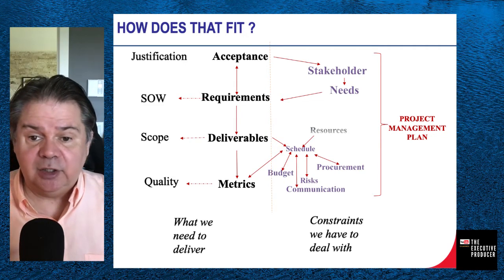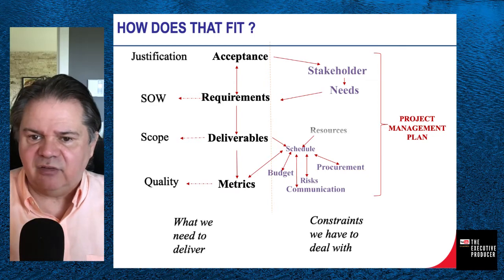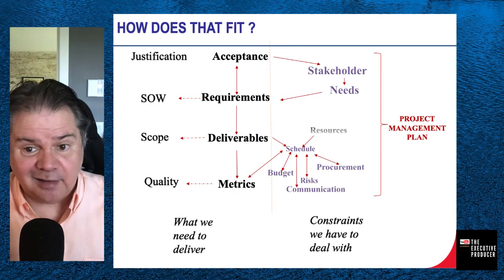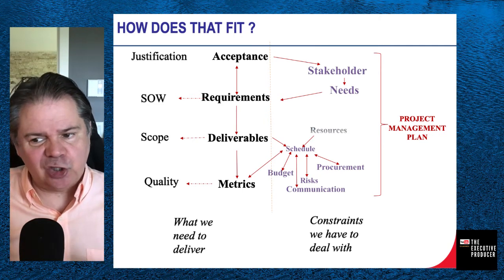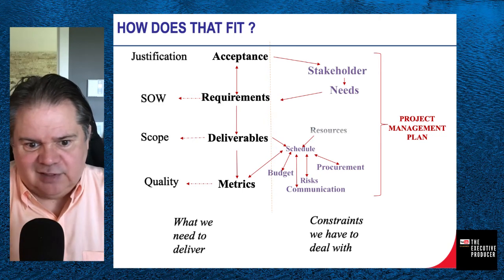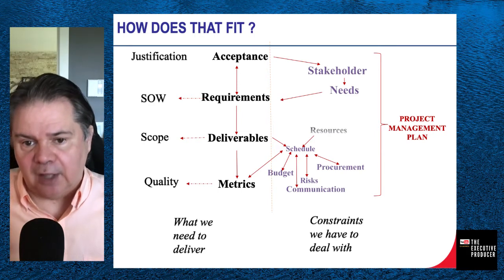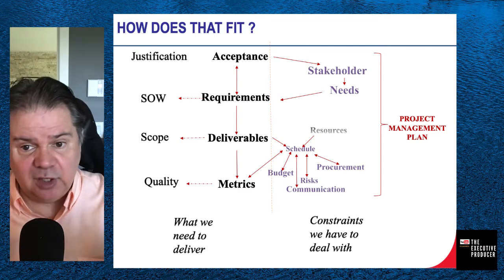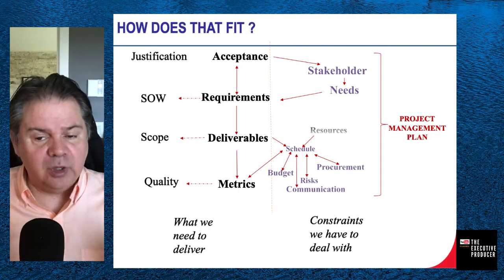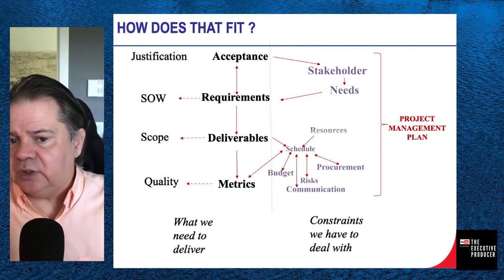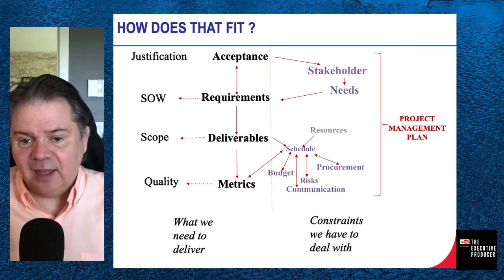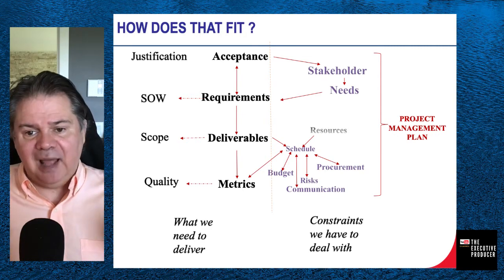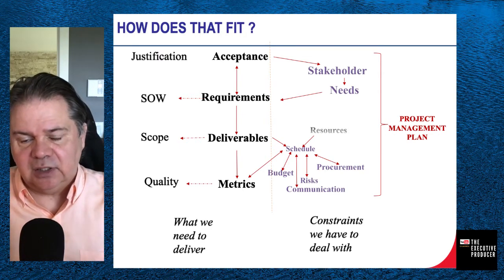And we will have quality assurance, which deals more with subjective criteria where there's not a pass or fail. It could be more like, I like it or I don't like it. So it would be a judgment call by someone who decides if it's acceptable or not. Therefore, we're going to need assurance on these and confidence we're going to hit the actual acceptance. So we're going to have to build activities to review with them: meetings, maybe some demos to get them to give you feedback, etc. So these two plans need to be integrated in the schedule.